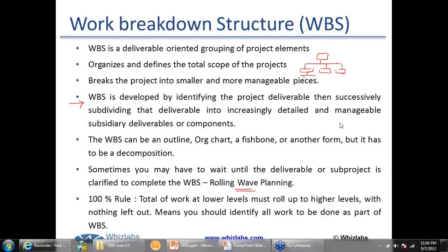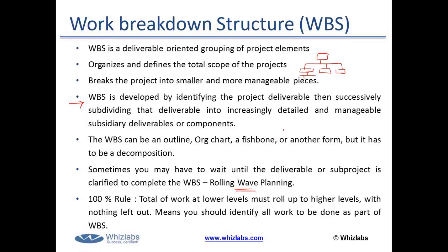It goes this way, or rather if you consult PMBOK 5.0, it says that rolling wave planning is a type of progressive elaboration. See, progressive elaboration is also the concept wherein you do the planning in stages. But progressive elaboration doesn't really say that you would not have the deliverables ready. It's always a possibility that you do the complete planning, and once your plan is ready and you are entering into the execution phase, then you decide how you would execute it.